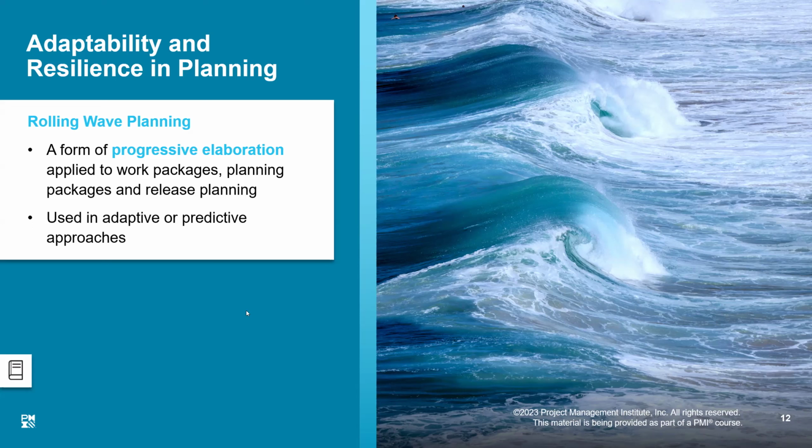You could plan, okay, we could have this kind of rock, based on the analysis, the satellite imagery or historical data. But what is hidden in the mountain, you actually do not know. When you reach that place, you may face that problem, and then you come up with a detailed plan to deal with it. So we cannot plan everything upfront, although we try our level best to create a very comprehensive predictive plan. We have to elaborate progressively when we face a specific situation and a new need or requirement arises. At that point, we further elaborate on our requirement and ultimately request a change in plans.